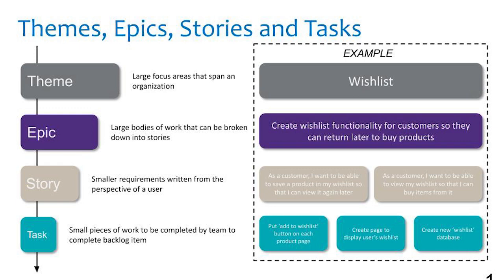That's a story. Another example is, as a customer, I want to be able to view my wish list so that I can buy items from it. Now, did you notice what's in there? As a blank, I want blank so that I can blank. And we'll break that down in a second.